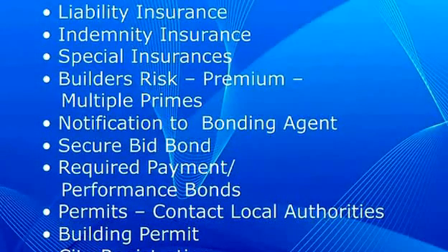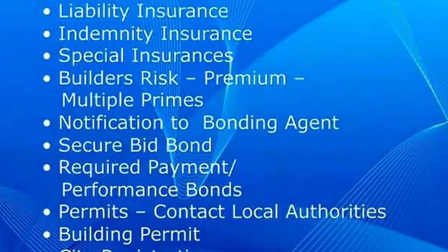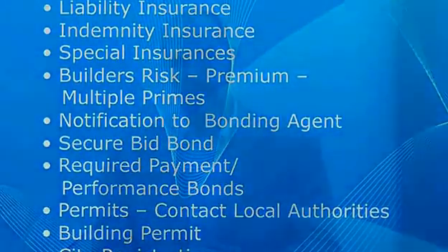Notifications to the bonding agent. Also, time management, you want to do that early. The bonding agent traditionally will tell you ahead of time what your bond premiums are. Is everybody familiar with the bond process? Okay, very simply put, there's bid bonds, payment bonds, performance bonds. There's also maintenance and warranty bonds. We won't get into those today, other than to know that, again, if the front end requires them, there's a cost. And talk to your bonding agent to get that cost and include it in the bid.